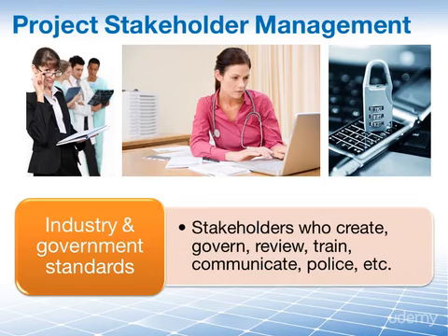Perhaps other parties within or outside your organization who are involved in creation, governance, review, training, communication, possibly accreditation and policing and ensure adherence to the standard. For example, if your project is requiring you to have patient medical records or information available online, you would need to consider stakeholders who are familiar with the different privacy and data protection standards as they are set by the government, healthcare and computer securities industry.